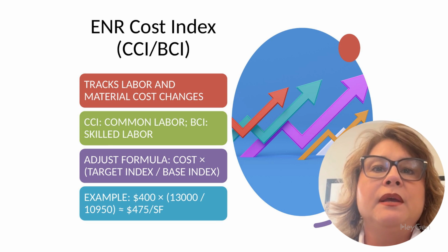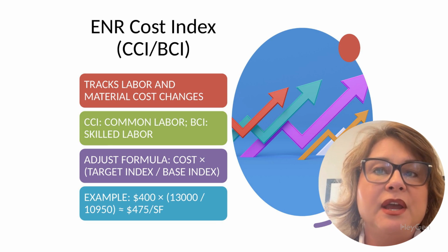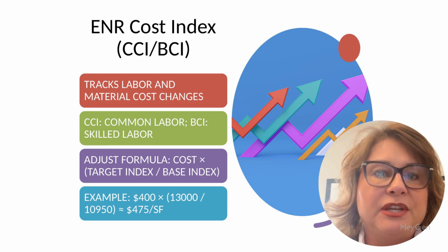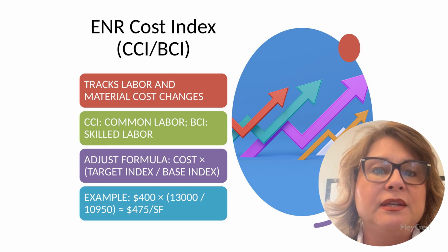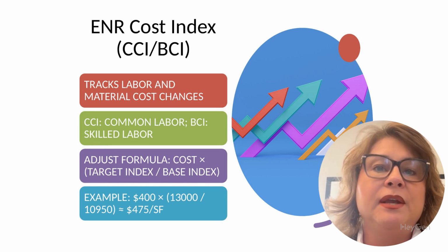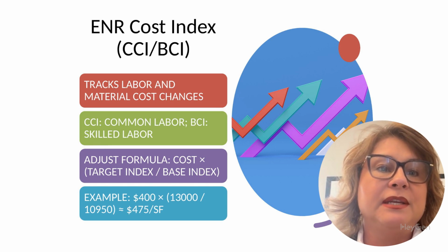Final reminder, when using ENR indices, always be sure to identify which index you're using, CCI or BCI. Know the original base year for the cost you're adjusting, and document your formula and source in your estimate backup. This way your estimates are transparent, consistent, and defensible.